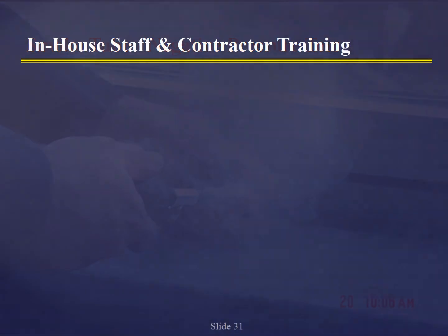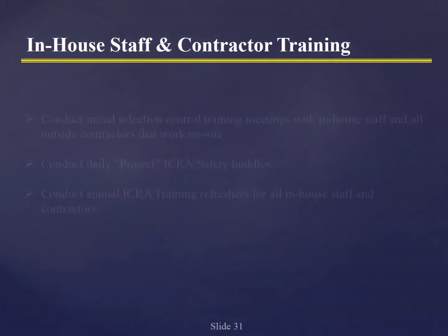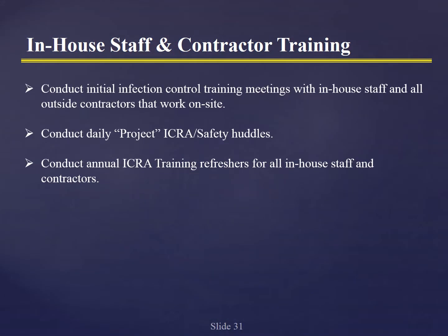Again, there's a lot of training that's going to need to go on when it comes to all of this. You've got to conduct initial infection control training meetings with in-house staff and all contractors. You've got to do daily project ICRA safety huddles and inspections. And then a more in-depth annual ICRA training for in-house staff and contractors would definitely be well to have documented.